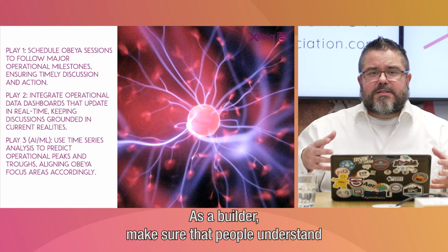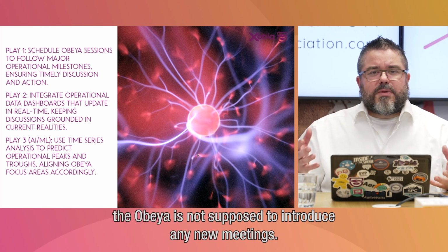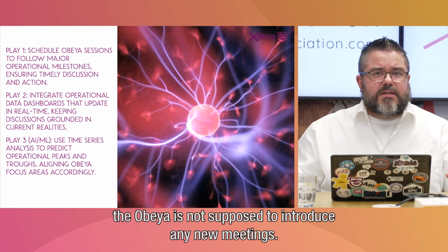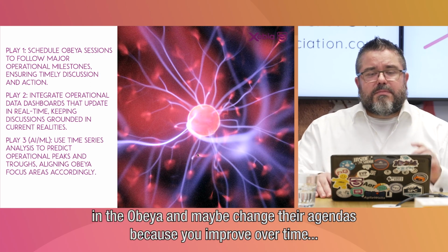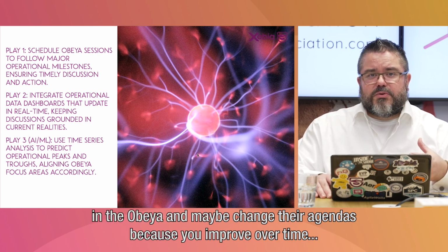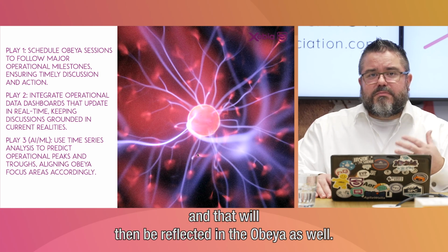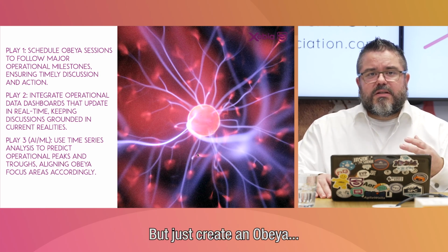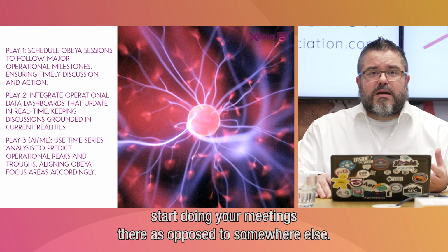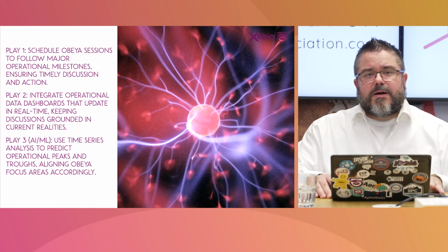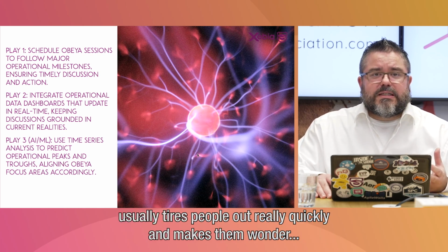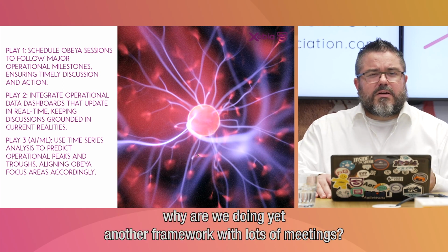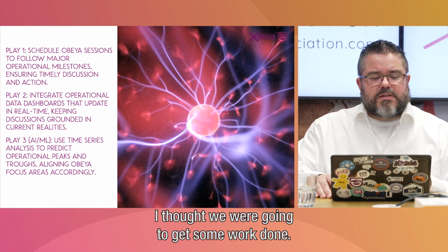And it really isn't. As a builder, make sure that people understand the Obeya is not supposed to introduce any new meetings. You take the existing ones and you make them better by holding them in the Obeya. And maybe change their agendas because you improve over time, and that will then be reflected in the Obeya as well. But just create an Obeya, start doing your meetings there as opposed to somewhere else. In my experience, having a separate set of Obeya meetings usually tires people out really quickly and makes them wonder, why are we doing yet another framework with lots of meetings? I thought we were gonna get some work done.